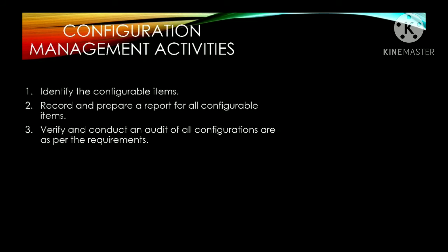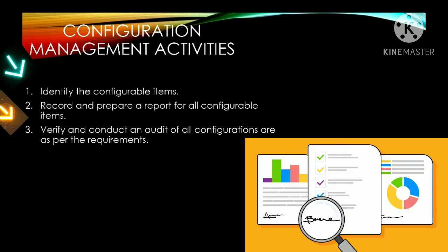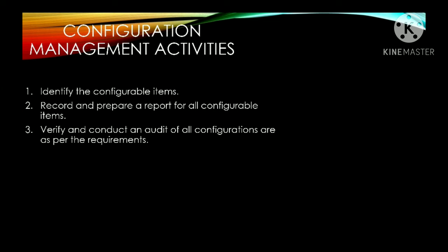So there are three types of configuration management activities. First, identify the configurable items. Second, record and prepare a report for all configurable items. Lastly, verify and conduct an audit of all configurations as per the requirements.